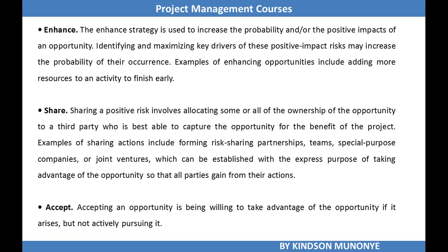Let's now look at enhance. Enhance is used to increase the probability of the positive impacts of the opportunity. Identifying and maximizing the key drivers of these positive impact risks may increase the probability of the occurrence. An example of enhancing an opportunity includes adding more resources to an activity to finish early.